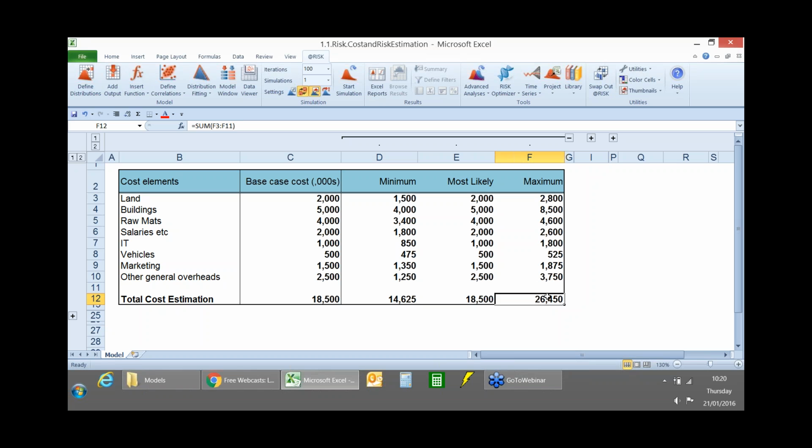I'll try and be polite, because really, when we talk about 3-point estimates, when we talk about minimums and maximums, what we're saying is that actually these are unlikely events in themselves. We're talking about this is the absolute maximum it's going to be. This is the absolute minimum, but those are unlikely events. So we wouldn't really expect to see a minimum or maximum cost actually being reached on a line item very often. The likelihood of 2 coming in at the same time, or 3 coming in at the same time, the odds just become smaller and smaller and smaller.